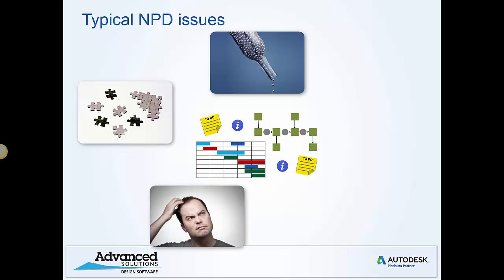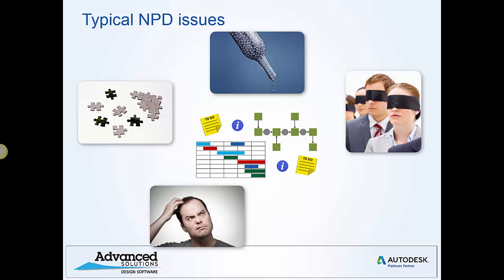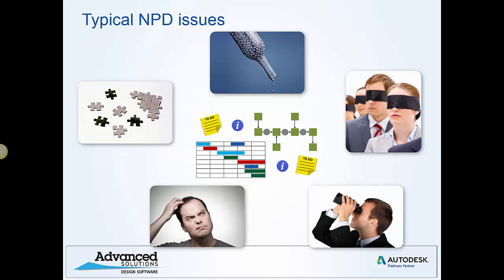Often a lack of understanding of what the process looks like and what tasks people need to complete causes problems. People are sometimes unaware that they have a task to do because they're not informed well enough of the status of the process or the overall project plan. Finally, one of the biggest time wasters is just trying to find information — often found in isolated silos across the company on hard drives, network drives, or in documents — and once found, people have to spend more time verifying that it's correct and up to date.